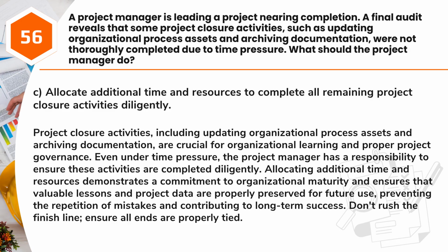Project closure activities, including updating organizational process assets and archiving documentation, are crucial for organizational learning and proper project governance. Even under time pressure, the project manager has a responsibility to ensure these activities are completed diligently. Allocating additional time and resources demonstrates a commitment to organizational maturity and ensures that valuable lessons and project data are properly preserved for future use, preventing the repetition of mistakes and contributing to long-term success. Don't rush the finish line, ensure all ends are properly tied.